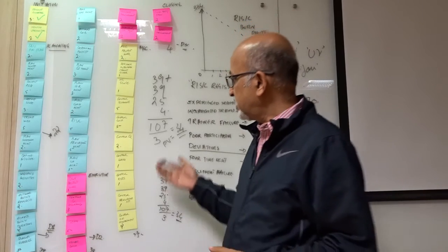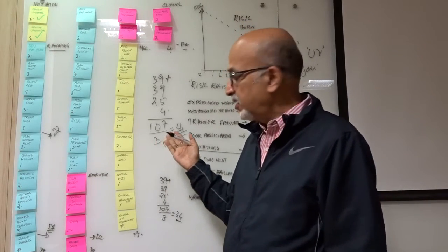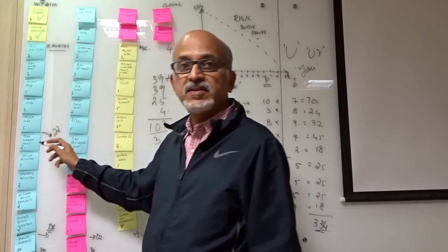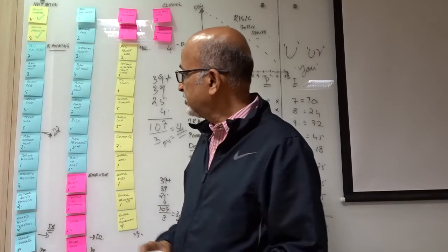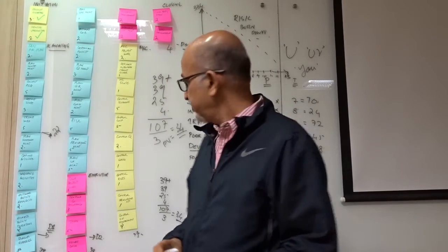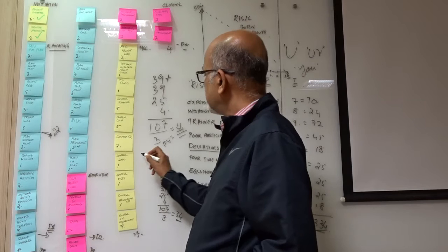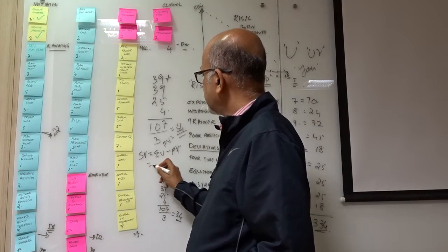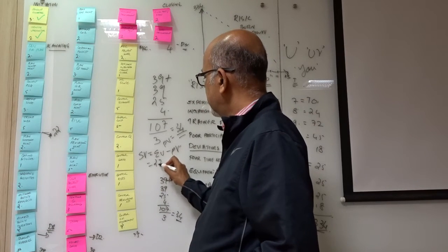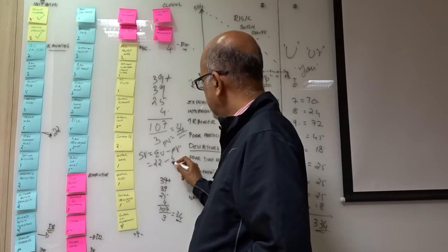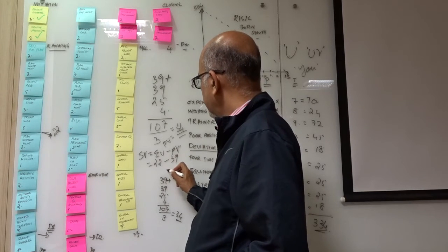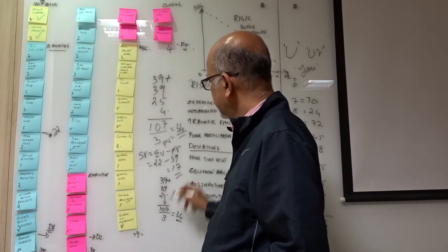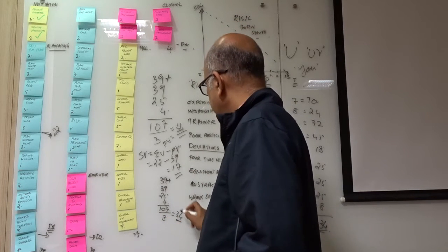Today our plan value was 34 for day 1, and what we accomplished, we could complete till this create work breakdown structure. So our earned value is 22. Schedule variance is earned value minus plan value. In this case, it is 22 minus 39, which comes to around 17 points.